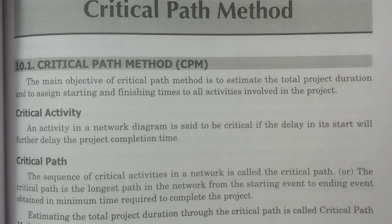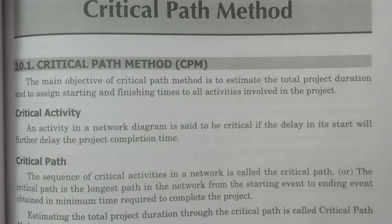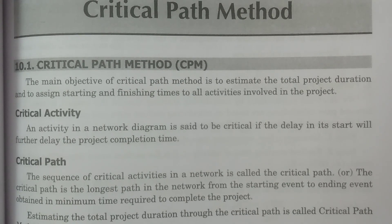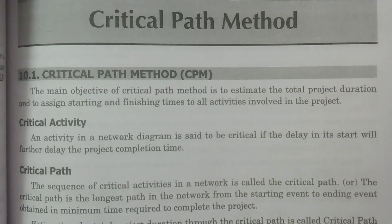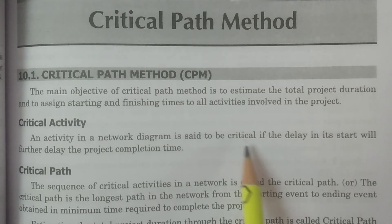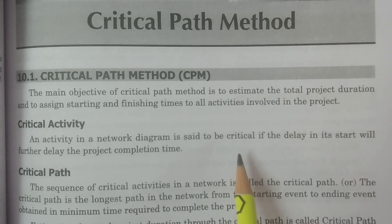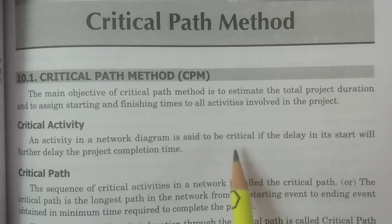For example, if we construct a five-floor building and consider the construction of the first floor, second floor, etc. — if you delay the construction of the first floor, automatically the entire project will be delayed: the second floor, third floor, and the total completion of the project will also be delayed. So whichever activity, if delayed, leads to further delay in the completion of the project time, that activity is called critical.